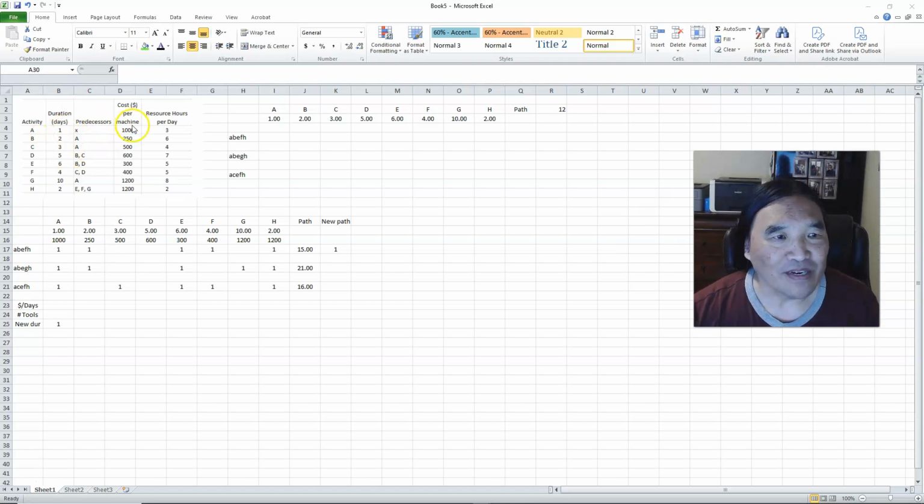For example, what it's saying is I have one machine and it takes 1 day. Well, if I buy a second machine, then it should only take half a day. So as the problem says, 1 over 1 plus n. But that machine is going to cost me $1,000. Maybe I'm better off buying it from a different place.